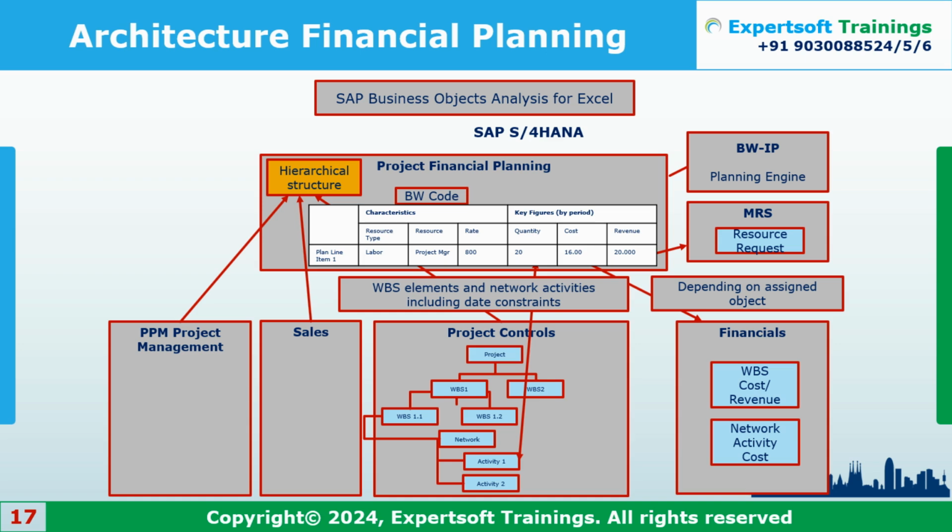So when I transfer to PS, it will be stored in some table in S4HANA, right? Correct. Whatever data you send from CPM to PS or PS to CPM, everything will come under your SLR reports as well as your line item based reports. It can be seen in the SE16 table as well, right? Yes, you can see ACDOCA P. In SE16, I can go to the COSP table or COSS table and see it there, right? COSP tables and all are the old classical tables. Why do you want to check them? You can check the ACDOCA P table.